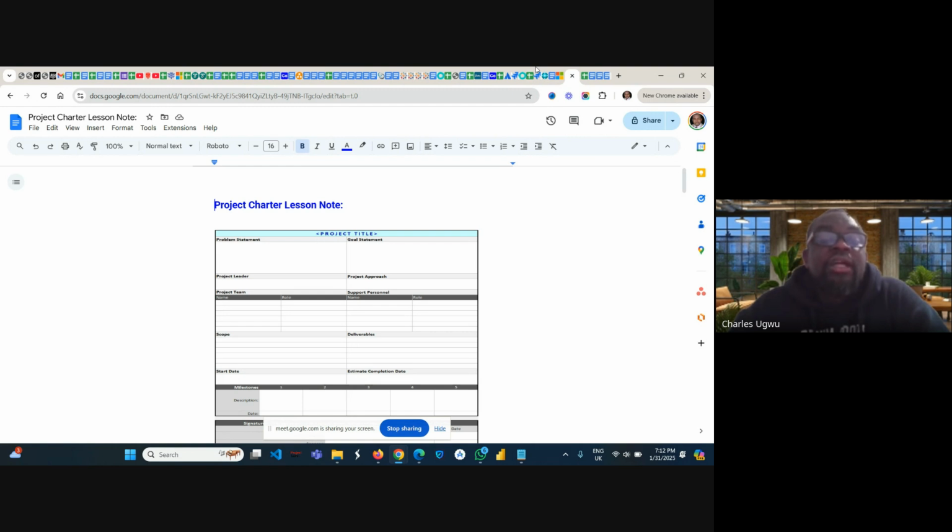And this is an example of a project charter. This is digital payment platform launch. The purpose is to develop and launch a secure digital payment platform for small and medium-sized enterprise. The project objective is to develop the platform within 6 months, integrate with PayPal, Stripe, local payment gateways, and onboard 100 SMEs in the platform within the first 3 months post-launch.